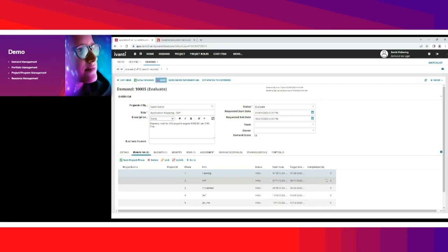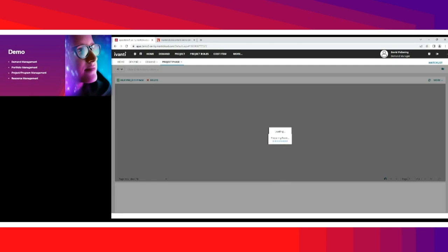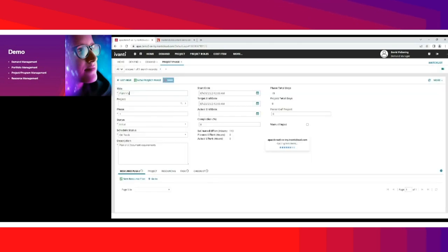So the first thing we can do is just look at what are the different stages that are going to be part of this project. We're not looking at resourcing it in detail. It's not allocating particular tasks to anyone. It's just really going through and saying, these are the different phases that we know we're going to have. And within each of those phases, we might then have resources that we want to have, or resource roles of types that we want to have in there.